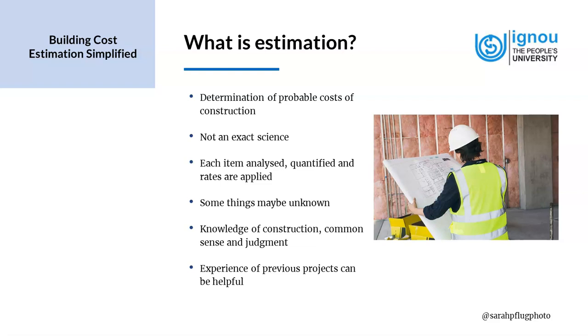Building construction estimating is the determination of probable cost of construction of any given project. Many items influence and contribute to the cost of a project. So each item must be analyzed, quantified, and priced. Because the estimation is done before the actual construction, much study and thought must be put into the construction documents.